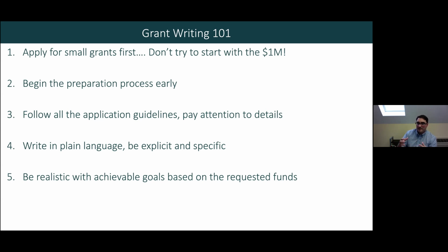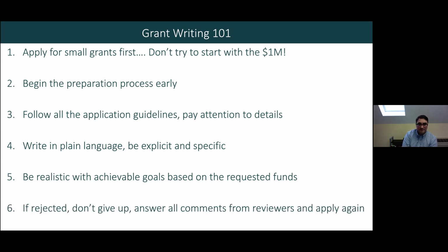So if we have a budget that is 100,000 and you are thinking about doing 300 studies around the world, most likely you are not planning well for that budget. And then most likely the reviewers' comments will say the proposal and the project look awesome, but this will require 10 times the money that they're requesting. In fact, for just that reason, they can rate it as an excellent grant, but most likely not fund it because the goals were not achievable.